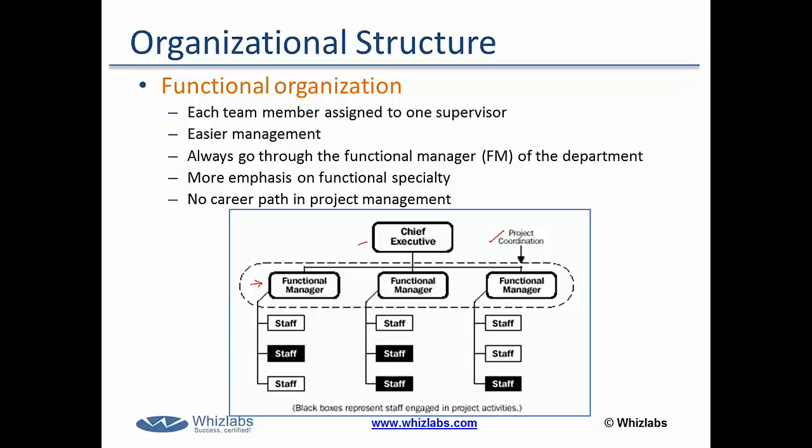The main characteristics of a Functional Organization are that each team member is assigned one supervisor, that is the Functional Department Head. This leads to easier management of human resources. The Project Manager always needs to go through the Functional Manager for any decision making. There is more emphasis on functional specialties and no career path for project management.